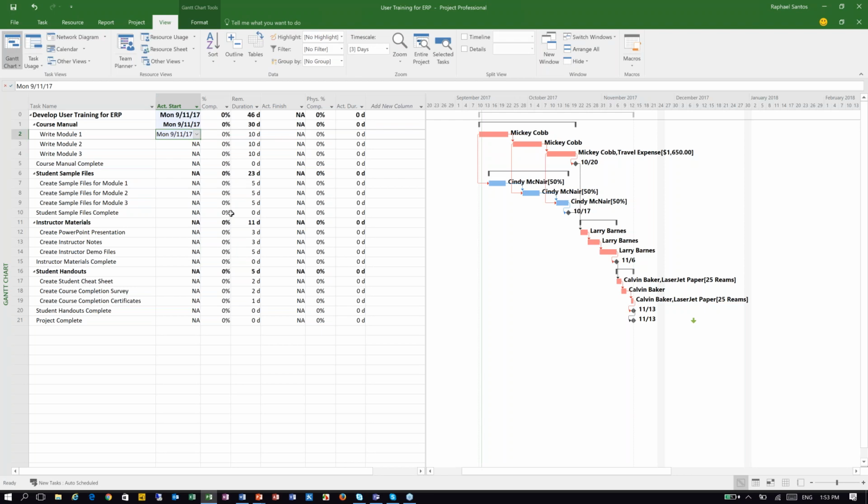And the reason is, if you are just using the percent complete, the software, Microsoft Project, is going to put the information as it was originally planned. But sometimes we do not have this situation. Sometimes the information has been changed. She was not able to start the task as it was originally planned. That is why I always like to ask when the actual start date was, so I can define it, and then the software can behave as I would expect.